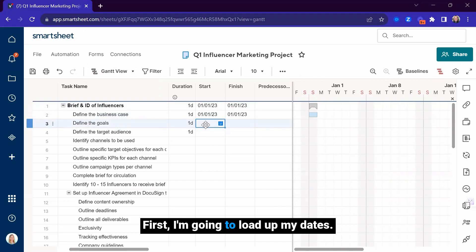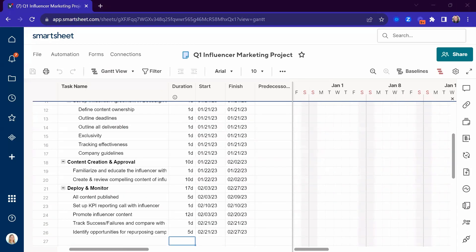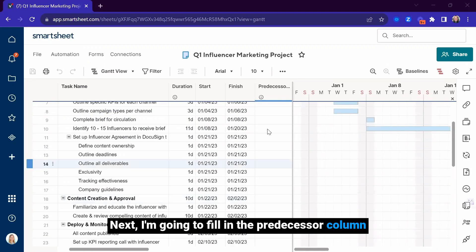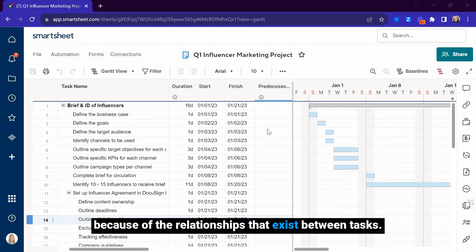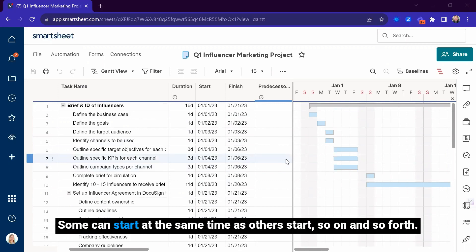First, I'm going to load up my dates. Next, I'm going to fill in the predecessor column because of the relationships that exist between tasks. Some can't start until others finish. Some can start at the same time as others start, and so on and so forth.